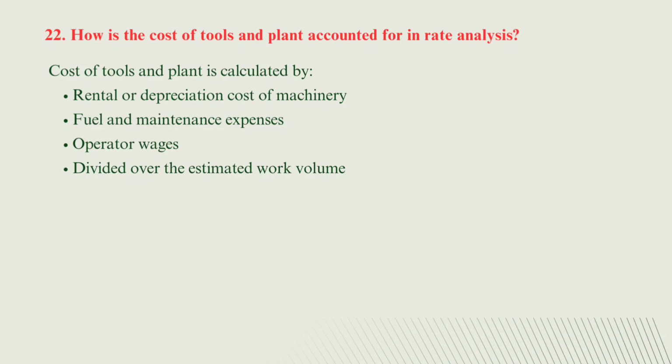How is the cost of tools and plant accounted for in the rate analysis? The answer is, cost of tools and plants is calculated by rental or depreciation cost of machinery, fuel and maintenance expenses, and operator wages, divided over the estimated work volume.